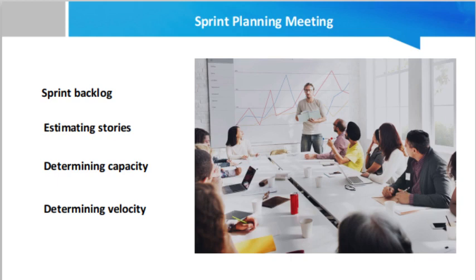The first thing is the sprint backlog. Your sprint backlog is a list of all the tasks you need to accomplish to complete the project. During the sprint planning meeting, your team will review the backlog to look at what's left to work on and decide what should happen next to keep the project on track. Any items not completed in previous sprints might be moved to the backlog, and new items that might have popped up during previous sprints will also be here.